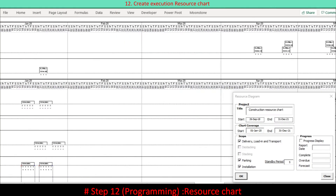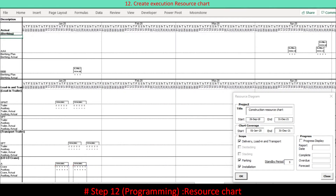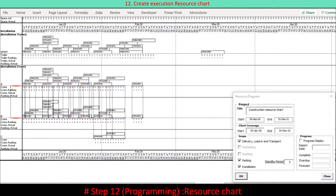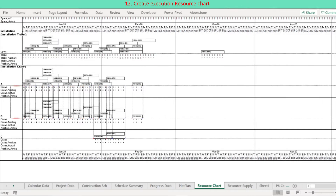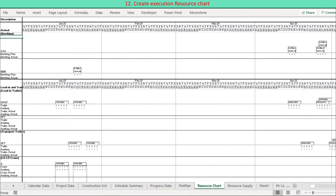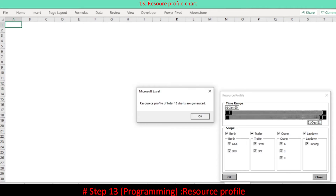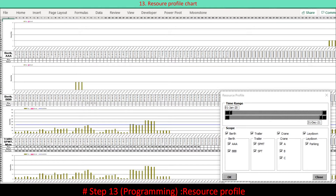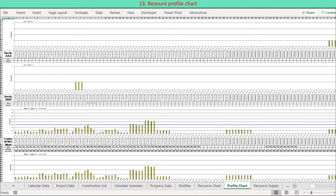A one-page presentation of the execution plan and progress presents all activities together with their resources in a single page, displayed in the form of a skyline along the timeline. Resource profile is shown using a column and line chart along the timeline — the column chart shows the plan and the line chart shows the resource supply limit, making it easy to identify resource overshoot at specific time periods.